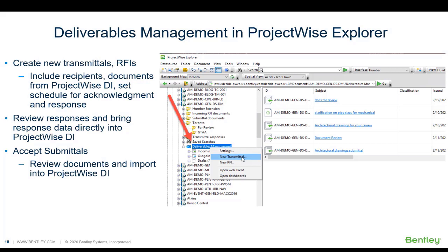The idea is it would give me the ability to accelerate my request for information process to get issues resolved quickly. RFIs can be generated easily and routed to the right individuals for response, clarification, or rejection with an automated approval process. And as I mentioned, an audit trail manages your RFI cycle from creation right through to closeout.